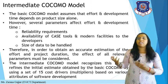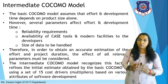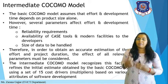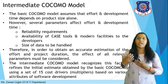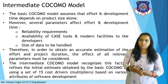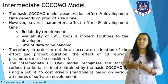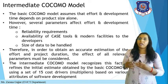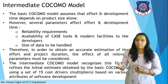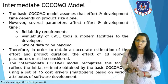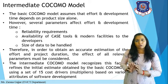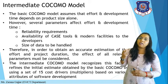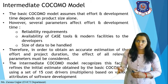As we already discussed, the basic COCOMO model needs a KLOC value. The basic COCOMO model has some disadvantages: it does not use different parameters for effort and cost estimation, and it always uses KLOC as the project size. It assumes that effort and development time depend on product size alone.